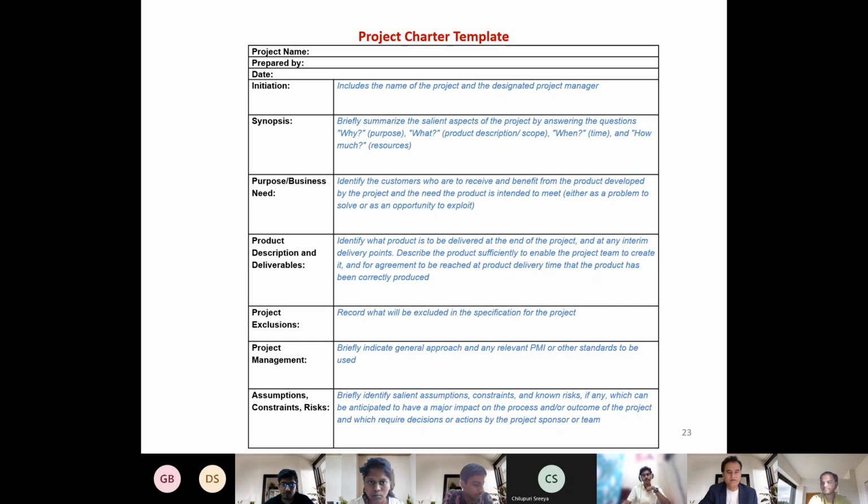Risks, you might just say the risk is we will trial this thing for the first time. So the risk could be the fish, or I think Professor Gaurav has mentioned juvenile. My understanding is that those are the young fishes, so if my assumption is right, then you will write that there's a risk that the young fishes that we put in may die, and therefore we need to replace them with another batch.